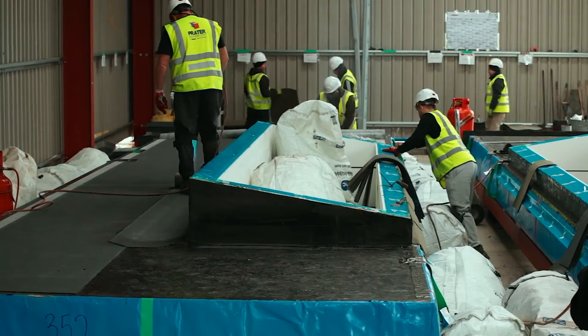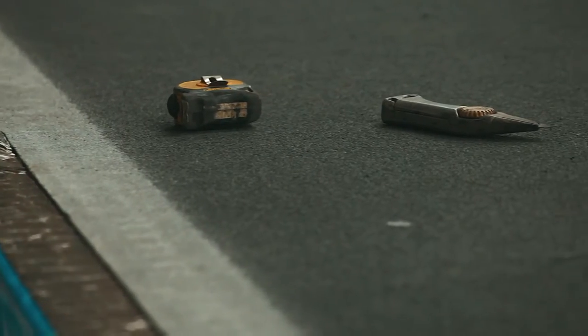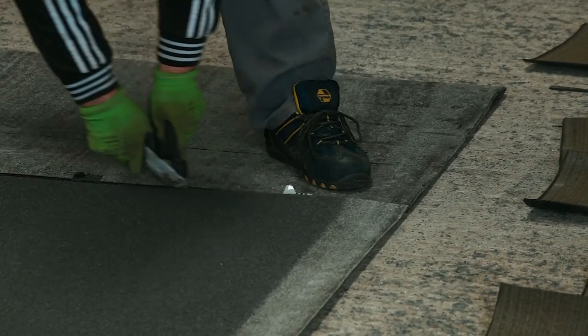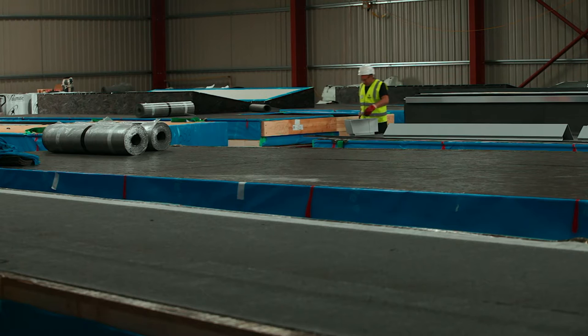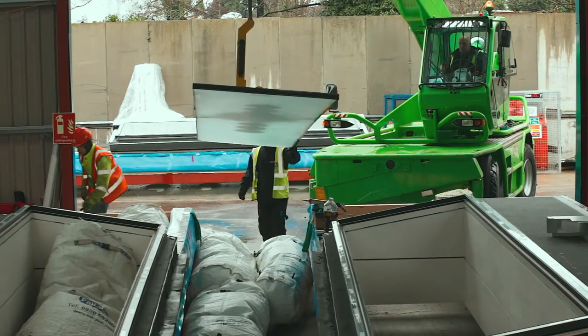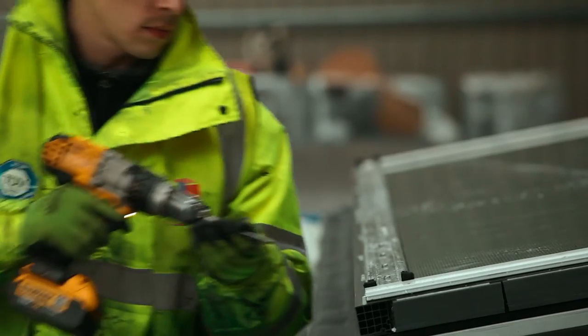The complex nature of, and the challenges we faced on Sky have been the design process, in getting the pre-manufacturing design into a place where we could challenge the timescales, which brought massive benefits on our health and safety on site by pre-manufacturing off-site. When we got involved in this project, we looked at the construction programme, and given the enormity of the roof and the facade, there was no way that this was going to be built as an in-situ project. The only way to get the outputs to deliver it within the programme period was to go down a unitised route.